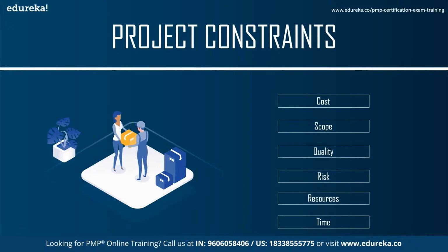Within organizations, project managers have to balance between not running out of money and not underspending because many projects receive funds or grants that have contract clauses with a use it or lose it approach to project funds. Poorly executed budget plans can result in a last minute rush to spend the allocated funds. For virtually all projects, cost is ultimately a limiting constraint. Few projects can go over budget without eventually requiring a corrective action.